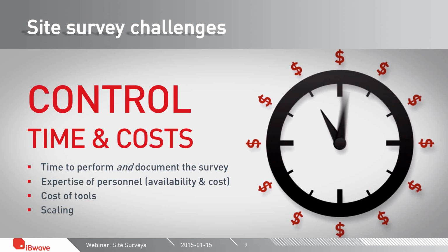Plus, it can lead to errors if they're not sorted in the right order. So that's time. Other than time, there's also the cost associated with the staff that's needed to perform the survey. If a high level of RF expertise is needed to carry out the survey, then obviously it could cost more. So the question to ask then is, are the processes and tools such that the expertise level can be minimized in order to lower that labor cost?